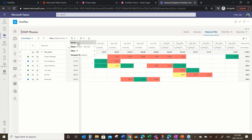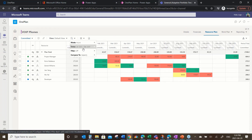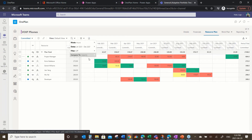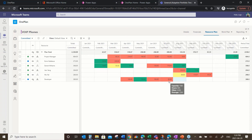I'm using hours as my mode. I could do it in percentage or FTE if that's how people think — tell me how many people you need in FTEs. Right now we're looking at the year 2021. I am comparing this to the overall capacity of the organization. As I entered the needs for a resource — say, I need another 80 hours of a developer — you'll see it immediately went red, because we have an over-allocation of developers in that particular month, and I've immediately been told that yes, you need time there, but there's a challenge we're going to have to work through.